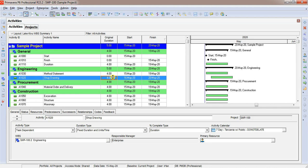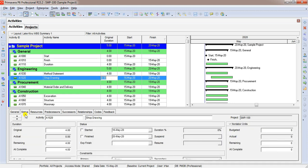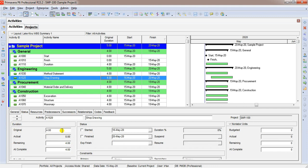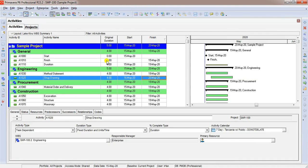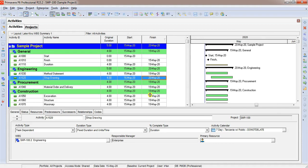You have option you can click here and change. You also have option you can go under the section status. This is a part of duration. You can change the duration. We are going to talk about duration in next video, but I'm just giving you idea how it works. You can work directly here or you can change from here. This time, let us change this from here. Let us put 10 days and see how it behaves. When we change the duration, you notice the finish date is reduced. This is how task dependent activity behaves in Primavera. I would like to tell you the activity calendar is assigned to each activity. We are going to cover calendar topic in our next video, so please subscribe my channel and don't miss the video.